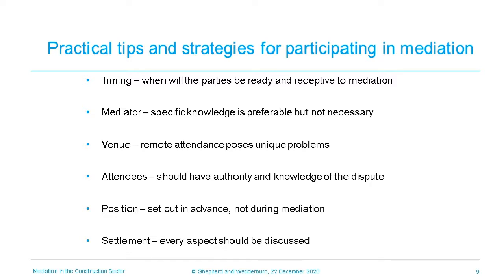Recognising these new challenges, the Civil Mediation Council has issued guidance on engaging in remote mediation. This highlights the importance of security measures, such as ensuring that any file sharing facilities or video conferencing platforms have the requisite data protection procedures and privacy notices in place in order to preserve confidentiality, that is such an important part of the process. Specifically, the guidance also asks mediators to ensure that files and other confidential information will be removed from these systems after a specified amount of time.